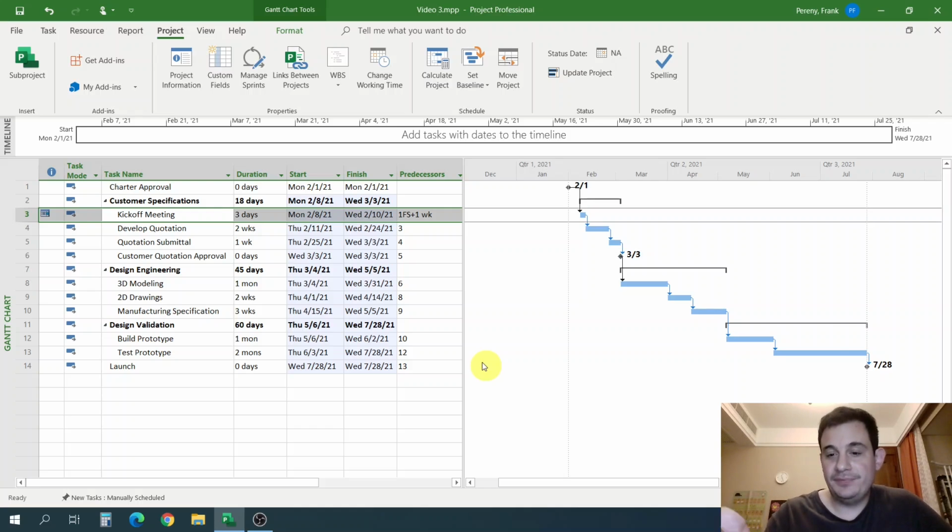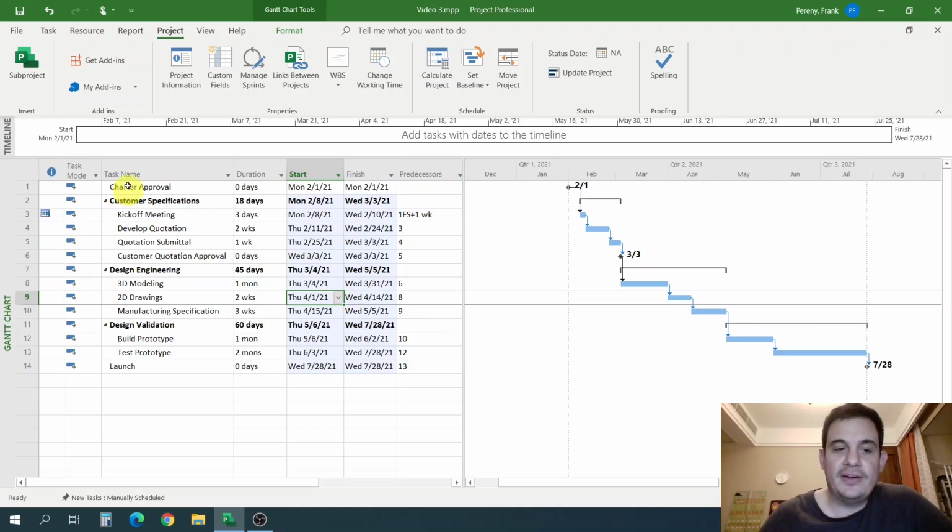And that's how you end up with project schedules that don't make sense. On paper, Project is telling you, oh, this would be done by June, but in reality, you're not going to be done till August, let's say, because your project file has been broken. Your constraints have over-constrained your schedules so that you're doing things when it's impossible. The information is no longer useful. So that's why it's so important to follow best practices and not just start manually moving things around and forcing things into constraints that could possibly hurt you in the future.